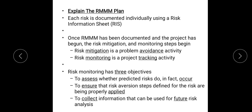Next is the RMM Plan. Each risk has to be documented in the plan using a Risk Information Sheet (RIS). Once the RMM has been documented and the project has begun, the risk mitigation and monitoring steps begin. Mitigation is a process of problem avoidance and monitoring is a tracking activity. The monitoring objective is to assess whether predicted risks occur, to ensure avoidance steps are being properly applied, and to collect information so that future risk analysis is done properly. That concludes Part 1 of Module 5. We will meet again in Part 2.